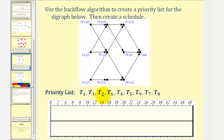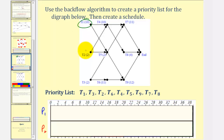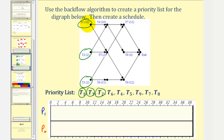Now that we have our priority list, we'll use the list processing algorithm to create a schedule. We'll have two processors — processor one and processor two. We first circle the ready tasks, which would be task one, two, and three. Task one has the highest priority, so we assign task one to processor one. Task one takes ten hours. We now mark task one as in progress, and assign task three to processor two. Task three takes two hours.